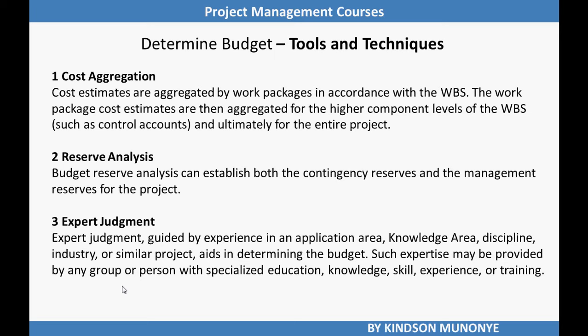Take note of how it works. We have cost estimates for activities aggregated to higher level components of the WBS. So you have cost estimates by work packages, and then to control accounts, and then to the entire project.